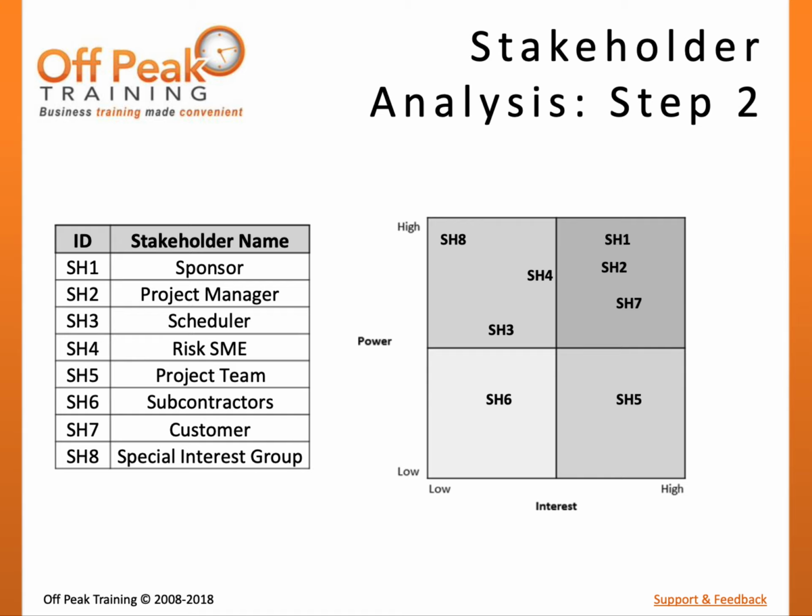Step 2 is to investigate the influence each stakeholder group may have to project execution. Graphical grids or salience models can be used to measure or prioritize the power the stakeholder has to change the project and the level of interest or concern the stakeholder has over project objectives and outcomes, and the level of involvement that is expected. In the power interest grid shown, stakeholders with higher combined power and interest scores will require higher detail and frequency of communication.